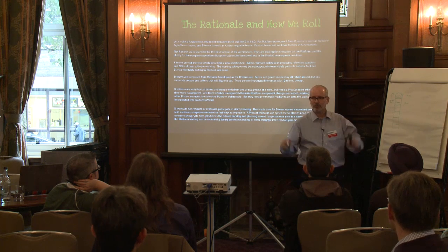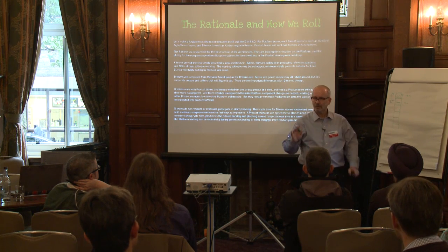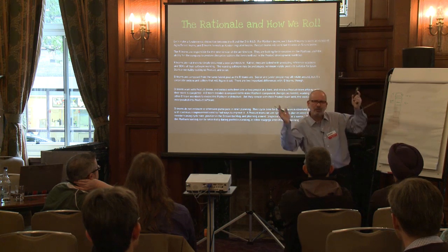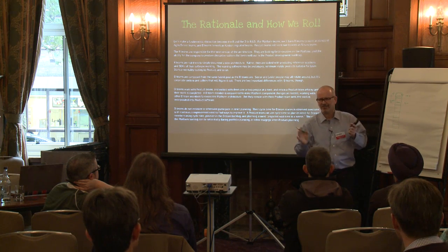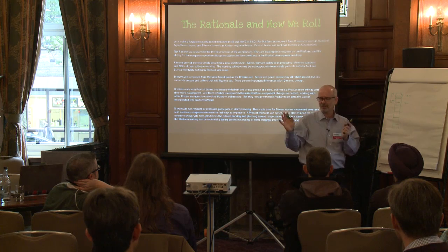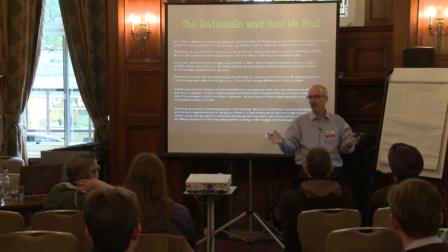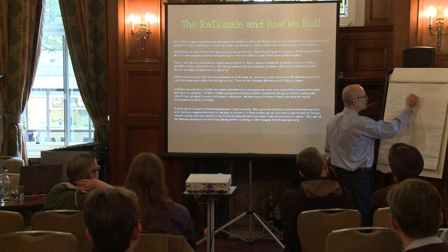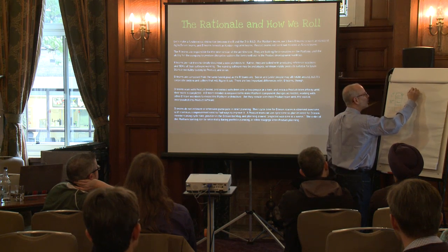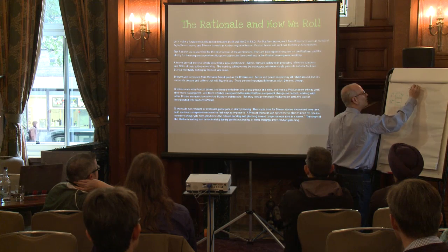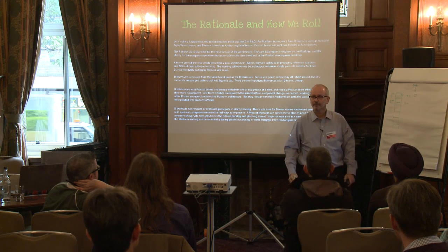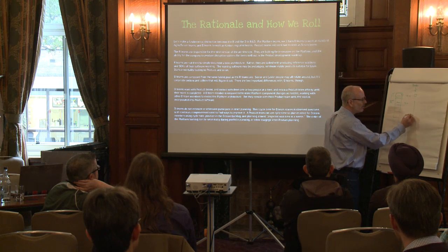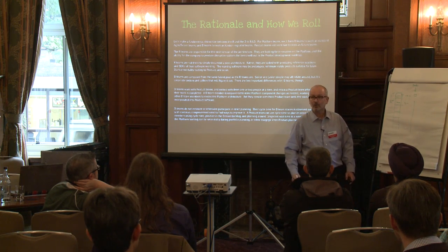As the product teams are doing their iterative development, they will uncover the actual bits inside of each of these things, which I'll call squad ready. Don't want people to estimate them, but there's something that's like a 1 or 2 week size, right? But we're not going to estimate them. We just know we have to do them. It's at that point that one of the available squads can pick up stuff in a ready state. All right, so we have a Kanban out here. We only put things into this column when they're squad ready.